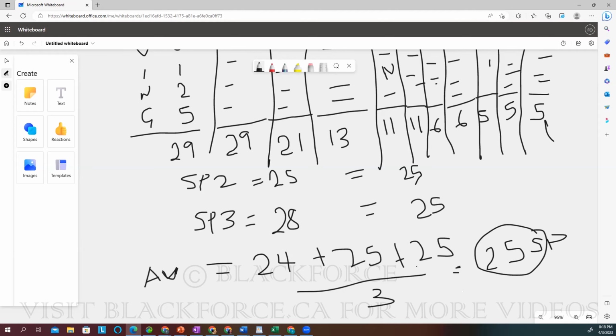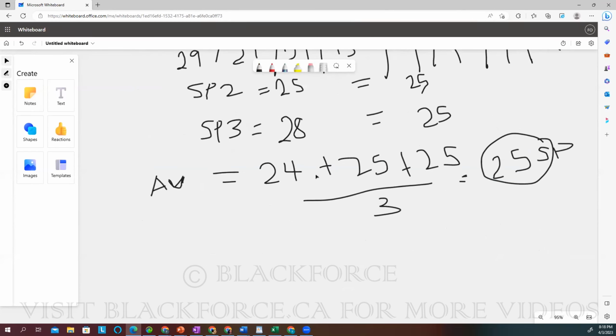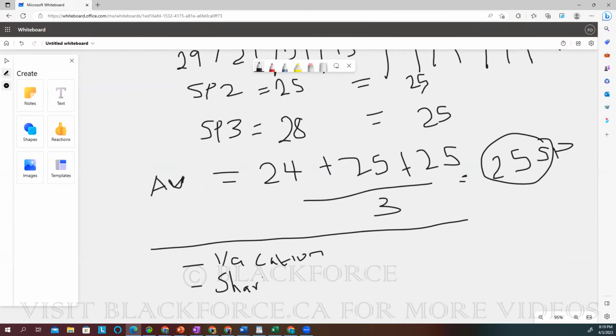Now, their average velocity is 25, right? But it doesn't mean that every sprint will be 25. There are some times it will be less than 25, right? And that will be based on certain conditions. For example, if some of the team members are on vacation, it will affect the story points. If we have shared resources that are going to be working with us during that sprint, it's also going to affect the story points, right? Remember what I explained as shared resources.